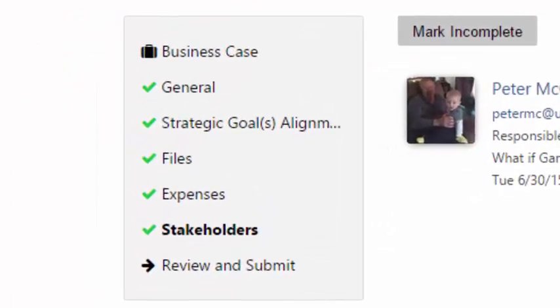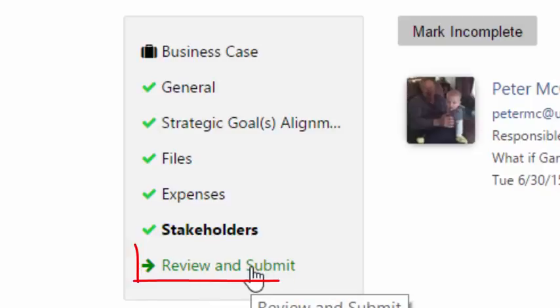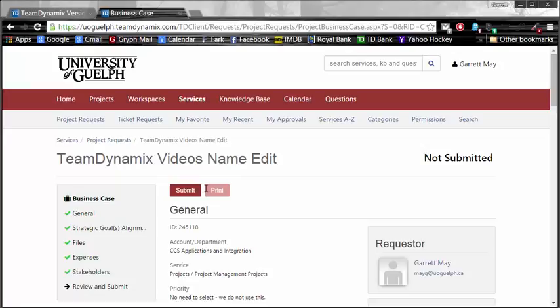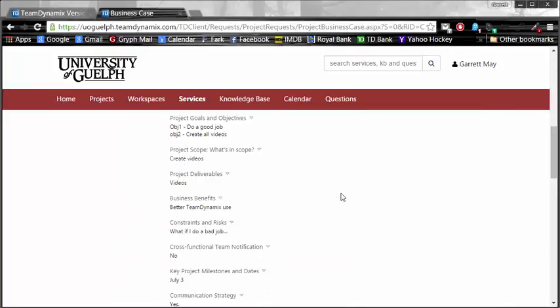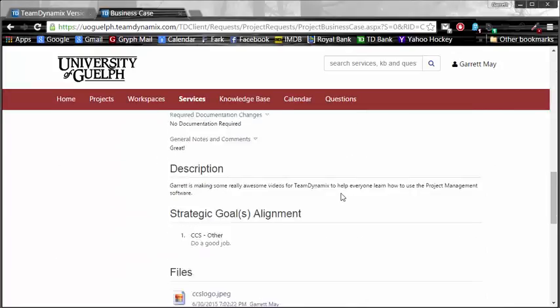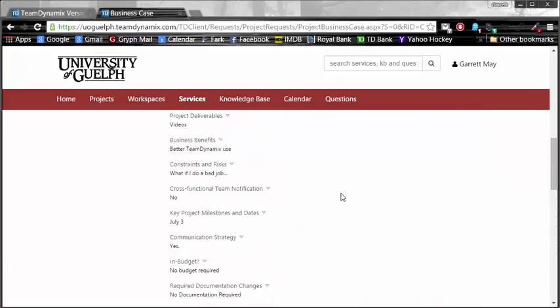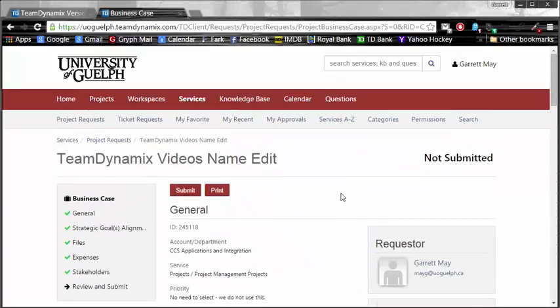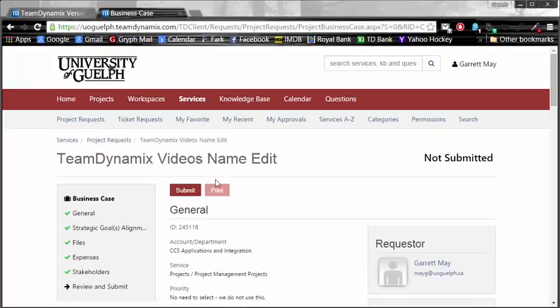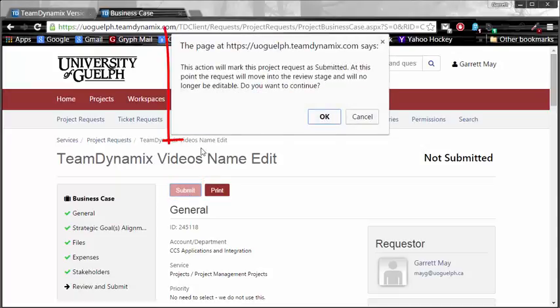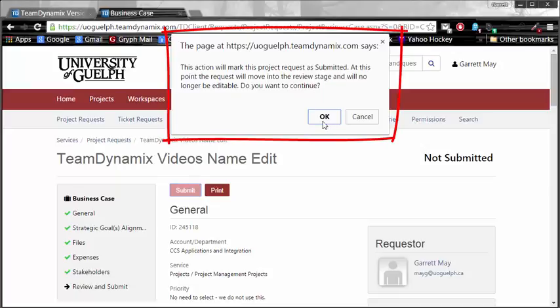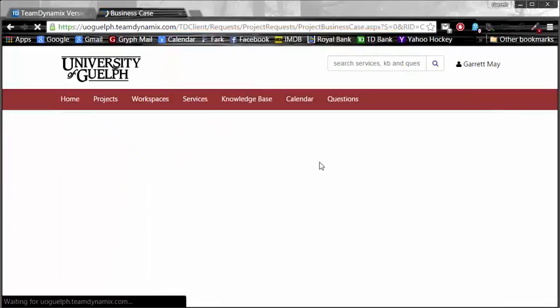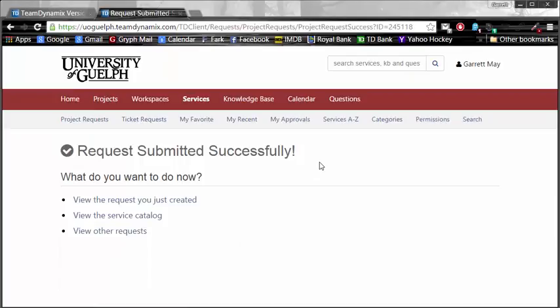So, I've gone through all five business cases now. I did general, strategic goals, alignment, files, expenses, and stakeholders. And the last thing you need to do is review it and then submit the request. So, I'm going to go in here, and this is going to give me a full layout of all the information that I have put into this project request. Double check, make sure you look, because once you submit, you have submitted. And right up here at the top, you'll see this print button if you'd like to print it out and have a copy of it, or submit. I am going to test the waters and submit. The page is going to say, are you really sure you want to submit? And I am positive. There we go. I have now submitted a request.